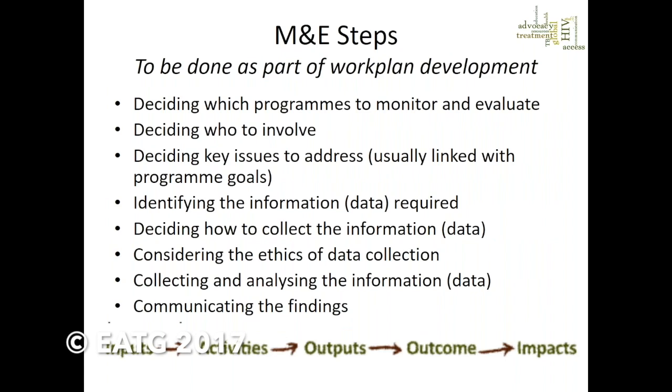So just the last slide of this introductory bit. What are the steps in developing an M&E strategy? Well, these are the various steps, and bits of these we'll be talking about as we go through the rest of today's presentation. It's deciding which programs to monitor and evaluate, deciding who to involve, because even though in many organizations there's an M&E officer who does the M&E, other people are involved as well, often other people collecting information that will be used for the monitoring and evaluation, deciding on key issues to address, identifying information that is actually required for M&E, because there are different types of information which you'll need for different bits of the strategy.